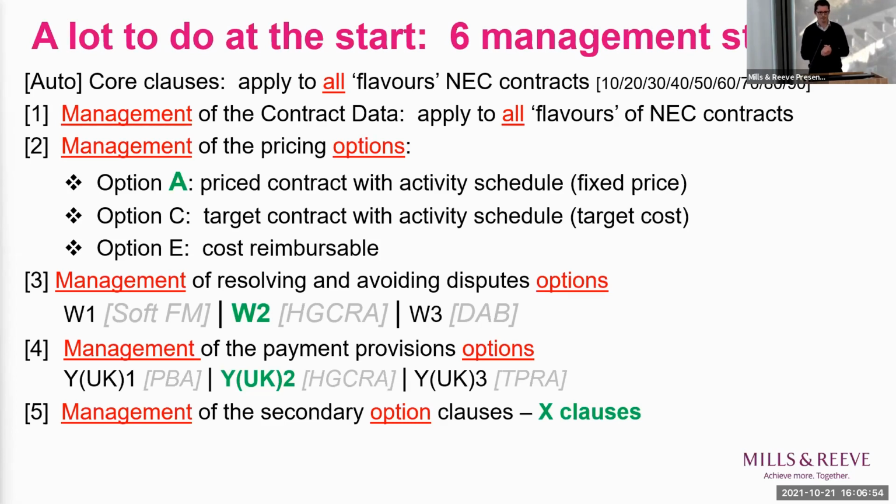in the UK market. Moving down to number 4 are the things which are specific to UK contracts, and in particular Y(UK)2 introduces all of that good stuff hiding away in the Construction Act around due dates, pay less notices, etc. Y(UK)1 deals with project bank accounts. That still is taking a little bit of time to be used by parties on larger projects, but it is there in the form of contract if that's something that's important for you. And Y(UK)3, the Third Party Rights Act, which again is often used by clients and contractors that use the